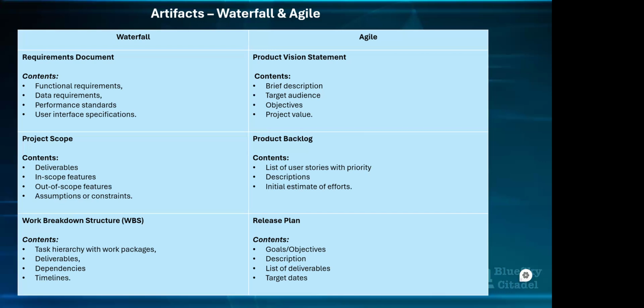So you're looking at 3 times 6, and you know that 18 sprints is what is going to take us to finish what we're working on. Each sprint is 2 weeks, so that's 18 times 2, which is 36. So 36 weeks is what is going to take us to finish this whole project. And with that, that's us looking at maybe 3 years or things like that. So that's just an example, no, not 3 years really. If we're saying 36 weeks, it's not even up to a year. Okay, so roughly that is what we're looking at when we look at our release plan.